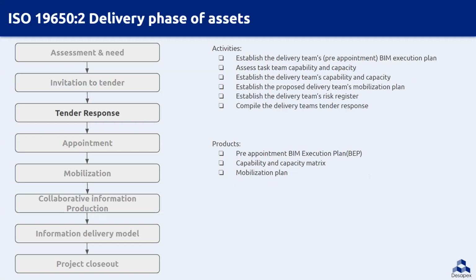So the next part is tender response. In a tender response, a pre-appointment BEP is submitted as a response to the tender. The selection and configuration of tools, what is the data management system, what is the file naming convention, might be a model federation, and communication protocols are the key points covered in a pre-appointment BIM execution plan.